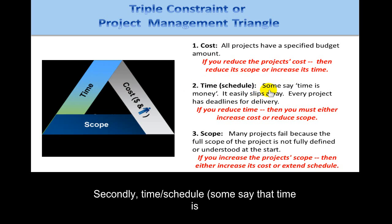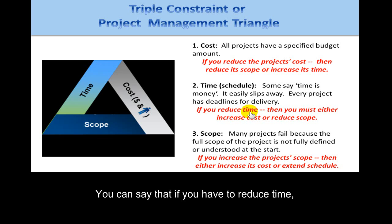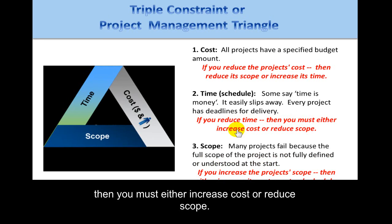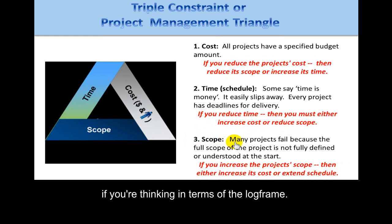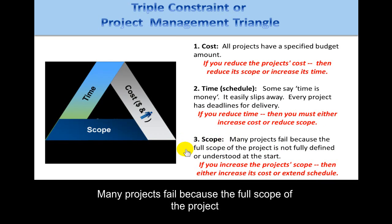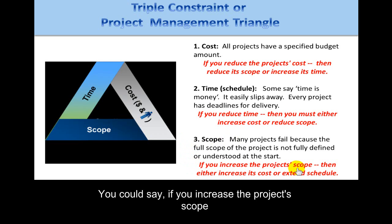Second is time or schedule. Some say that time is money — it easily slips away, and every project has deadlines for delivery. If you have to reduce time, then you must either increase cost or reduce scope. The third component is scope, which often equates to the outputs if you're thinking in terms of the log frame. If you increase the project's scope, then either increase its cost or extend its schedule.